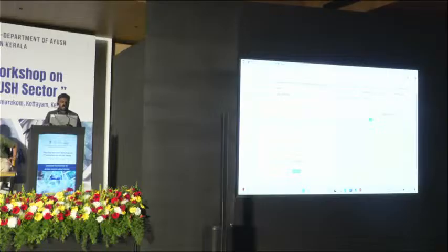What about the work status? Is it structural completed or masonry completed, like that? After that, they enter the physical percentage of completion and current expenditure status. And after that, the final approver is the SMD, who checks whether what was entered is correct or not, and finally enters it. So that's about the ERP general things.